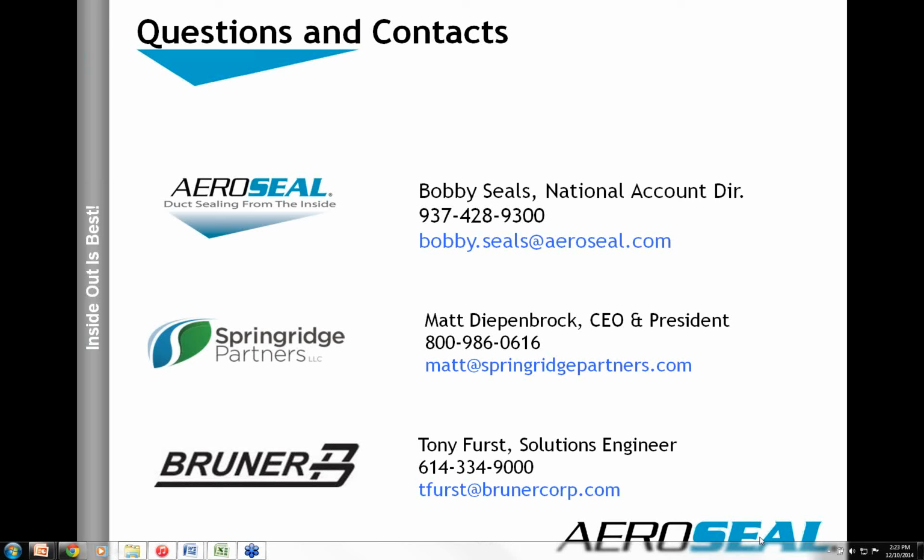Yes, we have done follow-up measurements. The commissioning agent is a firm based out of Dayton, Heapy Engineering. They have kept track of the energy numbers, and they have validated the energy numbers continuously over the past year. I would not necessarily classify that building as typical. Typically, on the jobs that we've done, we see duct leakage in the 25 to 30% range. That building was pretty excessive at almost 50%.